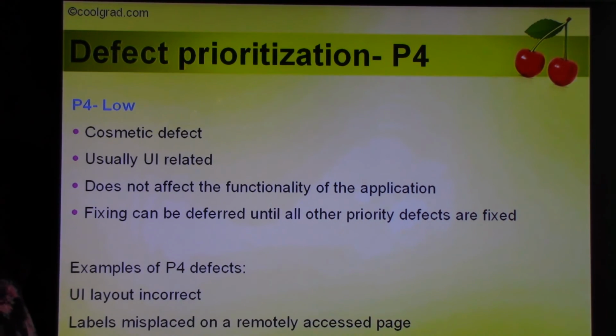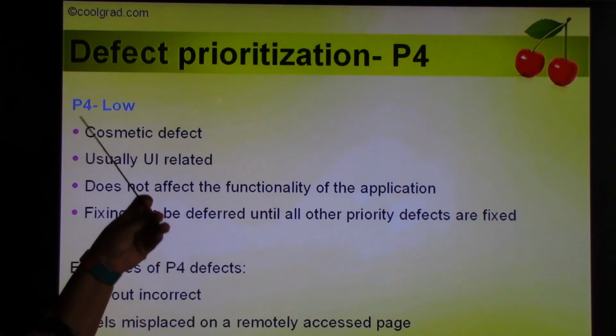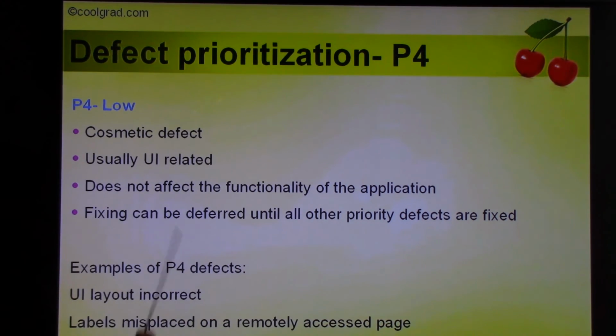P4 defects are low priority, least priority, and these are usually cosmetic defects. Usually UI related. Does not affect the functionality of the application. And fixing can be deferred until all the other priority defects are fixed.